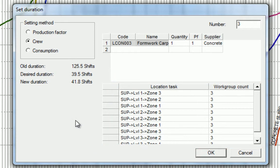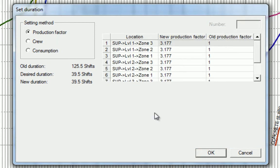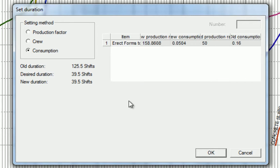Alternatively, we can modify the production factor, as we saw in the previous video. Choosing to modify the consumption is assuming we have an incorrect assumption in the production data, and as we know, changing consumption is changing hours per unit of work.